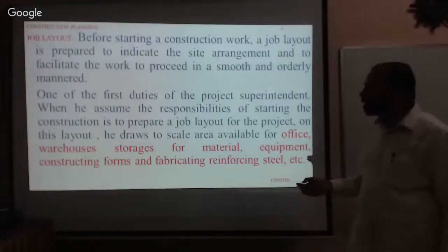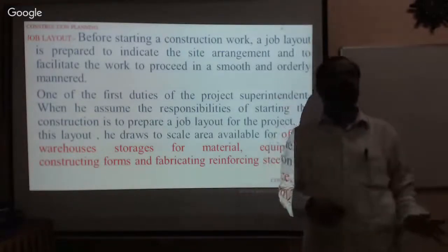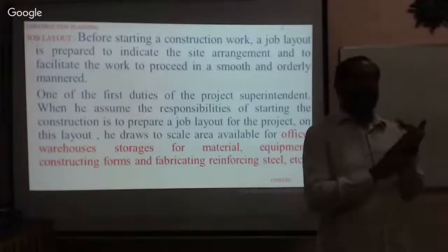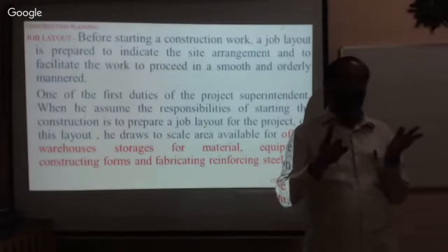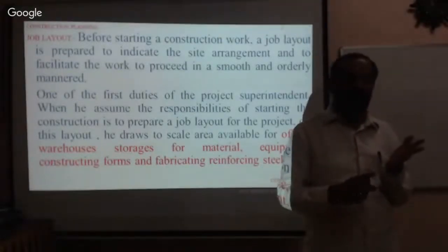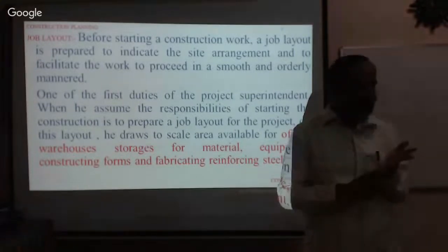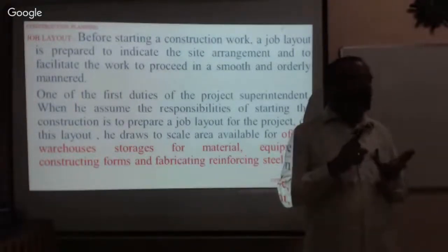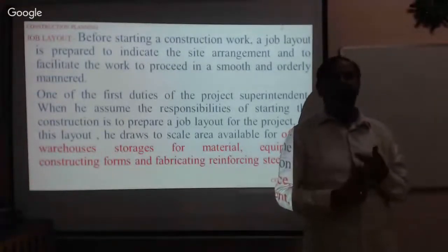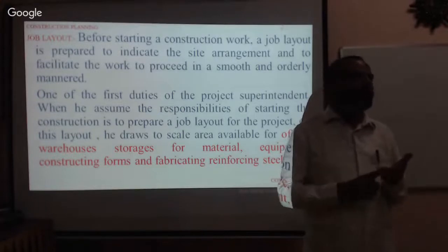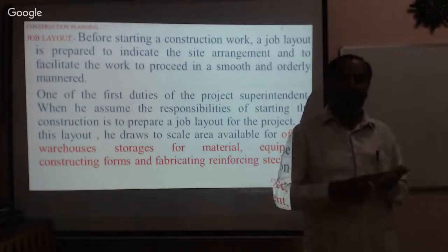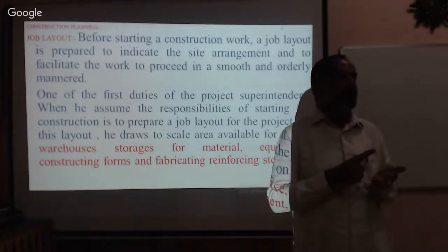Then job layout. This is another important issue to be addressed. Let us assume that the preliminary project is over. Preliminary means you have done the preliminary survey and the preliminary project report. The next stage: technical approval is done, then administrative approval is done. The money is ready, and you have prepared the detailed project report.